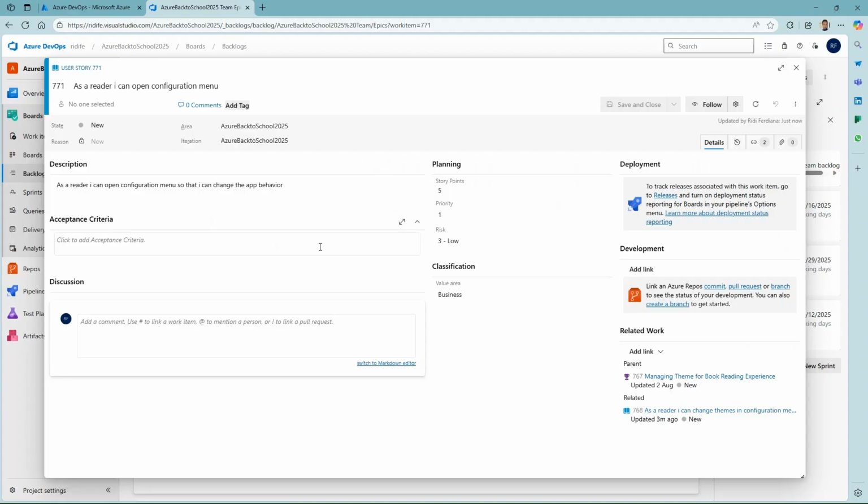Regardless of the story point, because the story point itself will only have an impact on how many user stories fit in a sprint, or in an iteration. But if you have first priority and the risk is high, please consider putting it later.